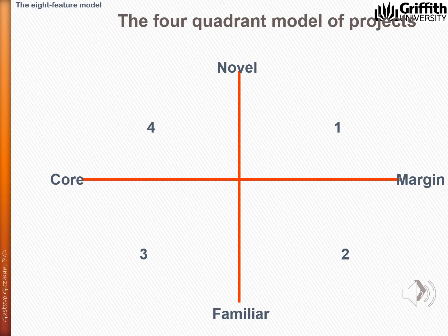Projects in quadrant 2 are perceived as incremental. That is, it is likely that there will be few implementation problems. The hassle factor is low. Time scales are unimportant, and penalties for errors are minimal. This is because changes are possible to reverse, and usually they are low-budget projects, and the organization has already done similar projects before; they are familiar. In this case, also, the level of vulnerability to the project manager is low.